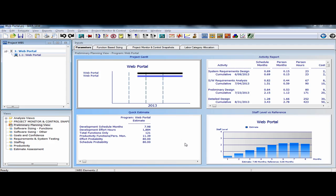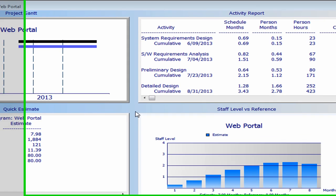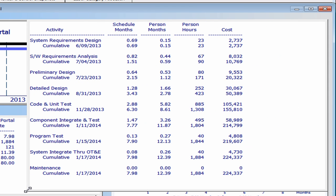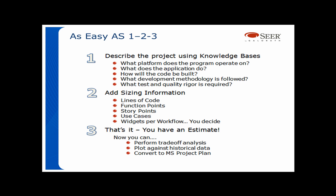Let's see what we've come up with for our web portal application. The development schedule is estimated to be approximately eight months with total effort hours of around 1,900 hours. When we used our function-based sizing, that generated a function point count estimate of approximately 121 function points. We wanted to be very conservative in this estimate, so our effort and schedule probability reflect the 80% confidence factor. If we look at the activity report, we can see that the numbers reflect a full lifecycle development project.